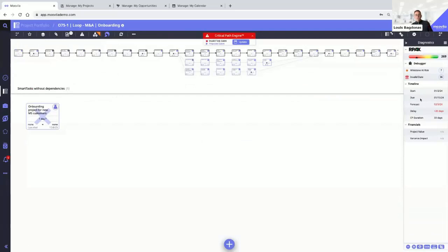the simple change of that start date on that project, we're now going to reforecast the start and due date of every single ticket within this project. So we're going to say, hey, the current start on this is 12/11. That is illogical. This project isn't starting until 1/2. And with that, we're now not going to forecast to complete it until 2/3, right? So based on that original due date of 1/15, we have a 20-day delay here.